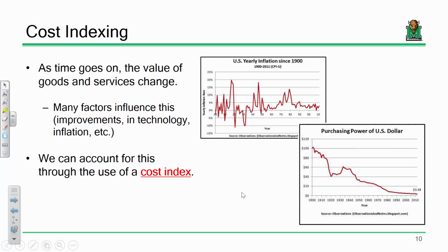The reason why that's important for us here is because, who's got the guide? What year does that come from? 2011, okay? So that cost data is good, accurate data. The problem is that data is from 2011. It's not 2011, it's 2018. So we need to adjust all of those dollar figures that are listed in that guide to 2018 dollars.